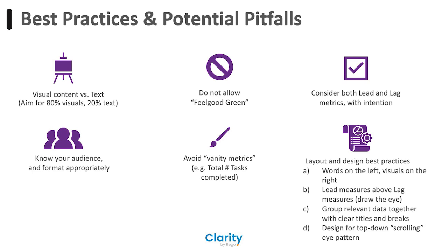All right, getting into several potential pitfalls and related best practices here. The first one I've already mentioned a few times, but I really want this to stick with you. That is finding the right balance between visuals and text. I think it's just keeping it simple here. I think the classic 80-20 rule is a good guideline. If we try to have it mostly 80% visuals, 20% text, I think that's going to be a really good kind of guardrail to stick to.